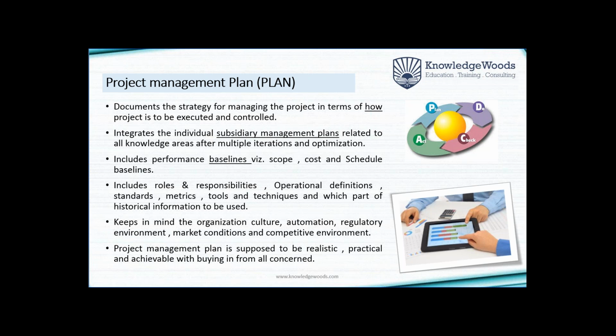schedule baseline also, that is, how much time it will take, and week by week or month by month, whenever we are monitoring, at this point of time how much percentage of work we should have completed, or how many deliverables we would have made out of the total project, right? So that